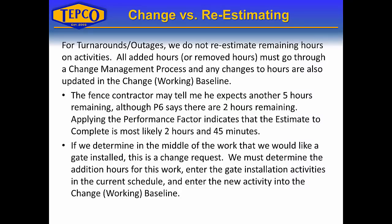Now let's talk about the difference between a change to the schedule and re-estimating. For turnarounds and outages, we do not re-estimate remaining hours on activities. If a contractor says P6 shows four hours remaining but they think it'll take six, we do not go into P6 and adjust the remaining hours to six. All added or removed hours must go through a change management process and be updated in the working baseline. We just try to get the work done as quickly as possible.